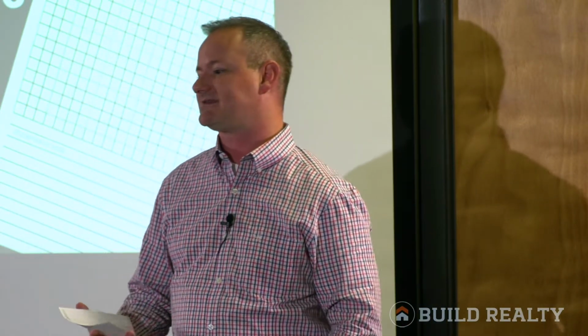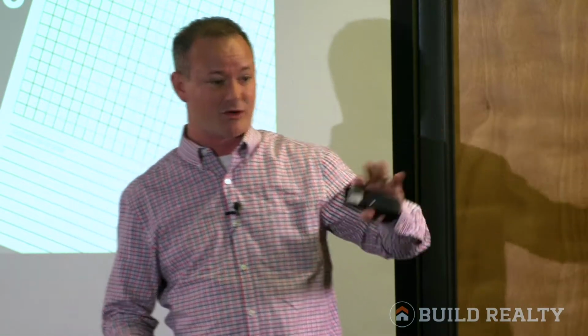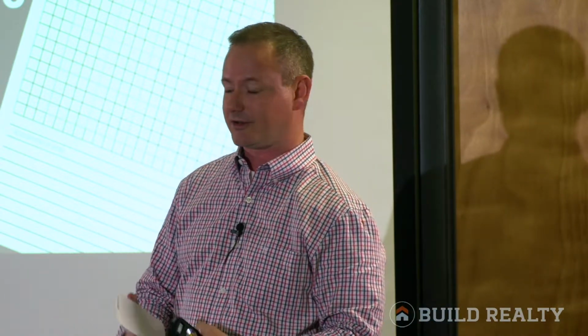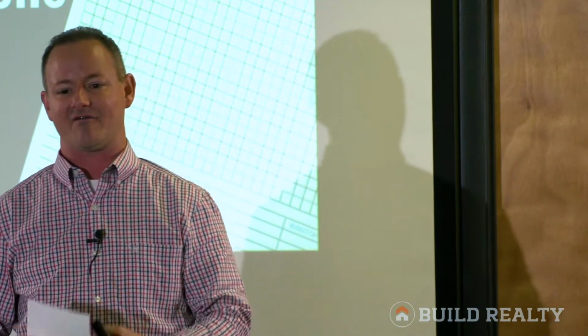If you do it right, it should probably take you about 2 hours to literally walk through every single room and write down every single thing that needs to be done. So you would write down, in a certain room, drywall patching over here, new window over here, new closet door, new closet shelving, remove that outlet cover. Every single room of the house, room by room, and you write down every single thing that needs to be done in that property. And at the bottom of our scope sheet, it has price estimates. So you can write down, calculate about how much it's going to cost, and it's going to be assigned a budget category as well.